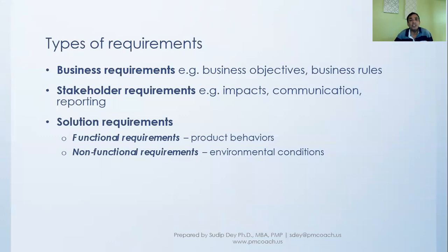But when they start to click, they realize that it is taking too long. Each page is taking around a minute or maybe half a minute. And then you find that though you have put together everything that they've said perfectly, this product is effectively unusable, because some of the non-functional requirements were not taken into consideration.